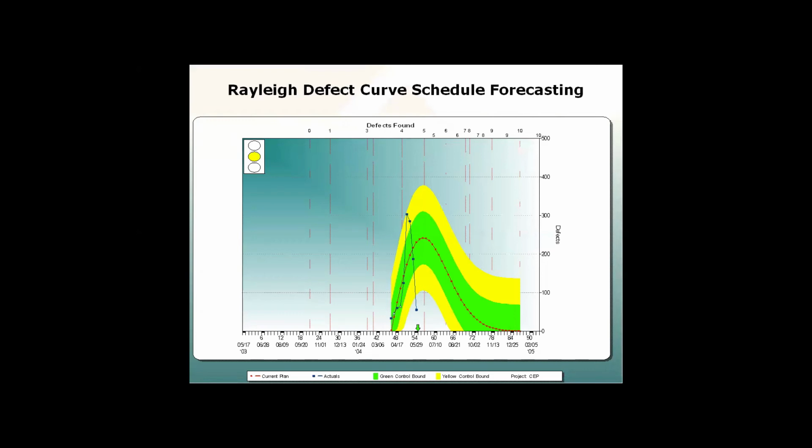It would be in the late October, early November timeframe. This is one of the earlier projects where we really found remarkable prediction accuracy on just looking at the predicted schedule based on the bug curve from our mathematical models. And we came up with sometime around November, early November, late October, when the code would be ready for prime time. Based on what we were seeing in the actuals, which were really high and spiky, we expected that because of a very large team under schedule compression.